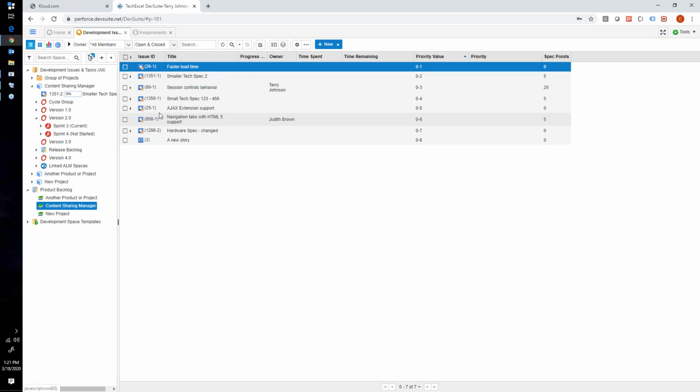Okay, so if you were practicing sprints and whatnot, you normally can tell, or as the process gets more mature, you're able to tell how many points can be sitting within any given sprint. So let's just say I'm mature enough to determine that, hey, every sprint we can do about 50 points, right? What I'm going to do then is, since this is a prioritized list, I'm going to go ahead and assign about 50 points worth, right?